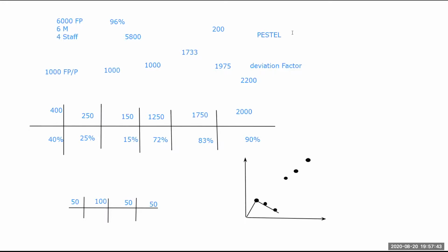This is what we call, when you start the distribution, the baseline. This is your target. The overall number is also the number of your beneficiaries; if it is a family, they call it a household. It is 6,000 households, and you reached 5,800. So when we have some problems and issues in distributing, we have to read the data, analyze the information, and make the action.